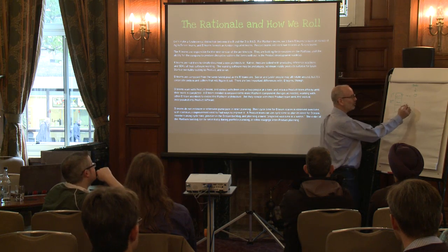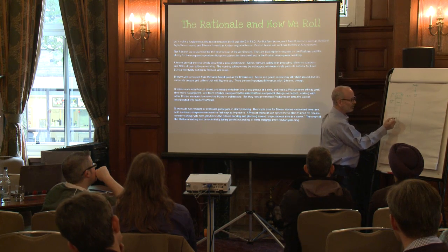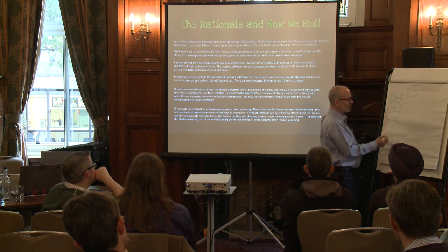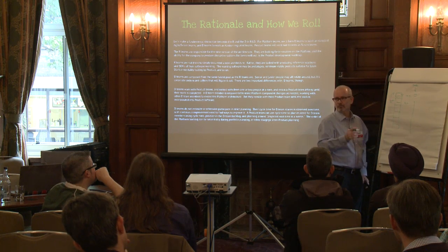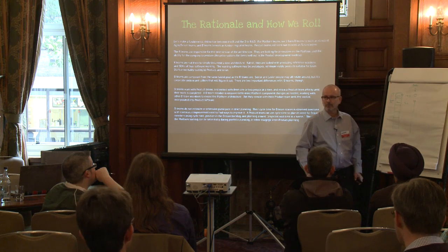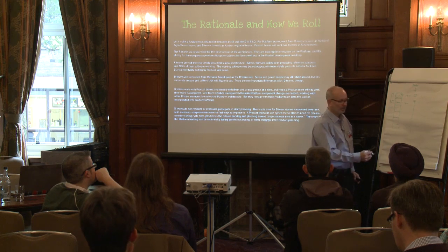If there are items inside this column, they also have to be ranked in initiative order. So this guy comes out and has something that's squad ready. Well, that's fine. You can put it in there. Here's your next item for the next squad that's available to work with.